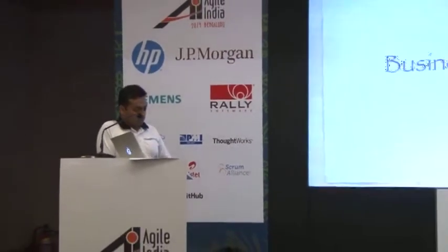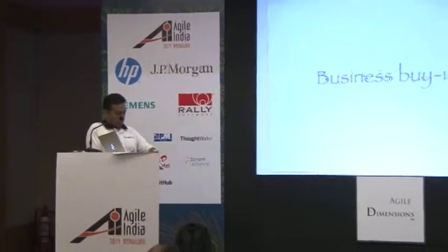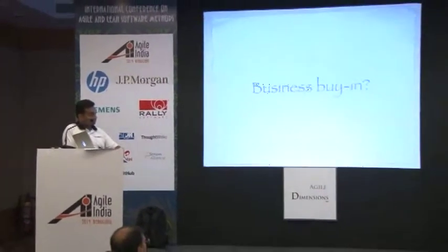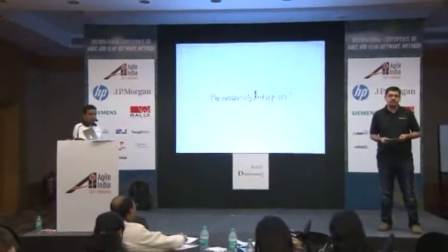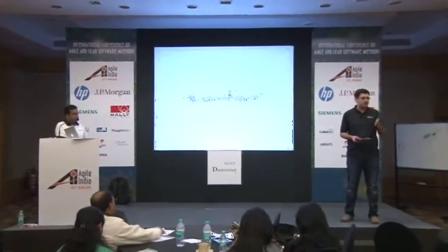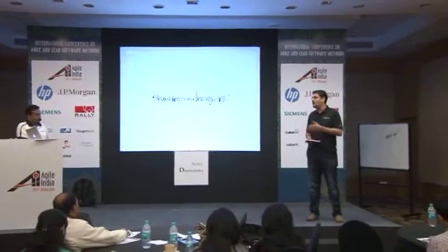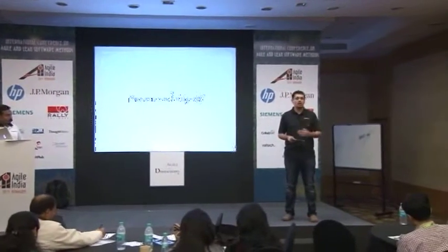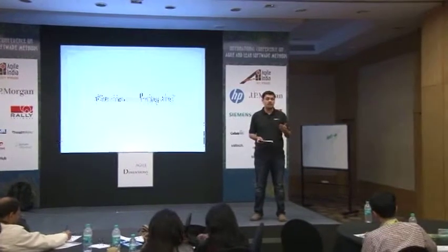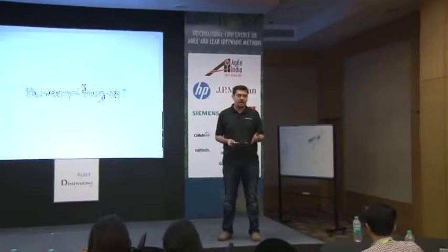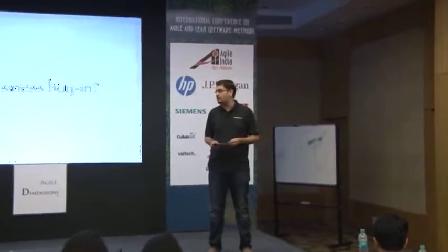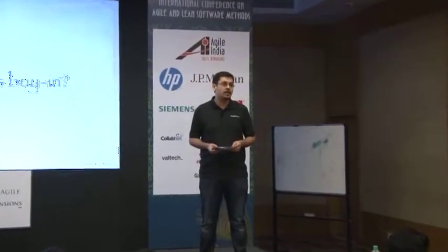So the other one is, is there business buy-in? That's the example I gave you, right? Is it just IT that's bought in, the IT organization has bought in and said, yeah, we're going to distribute it? If no one has had a conversation with product or with business saying, what does going distributed mean for you? What does it mean in terms of how you will interact with people? What might it mean in terms of stretch into early morning calls, late evening calls? If those conversations have not happened, again, it will be a red flag for us, because it will mean that likely we will hit problems later.